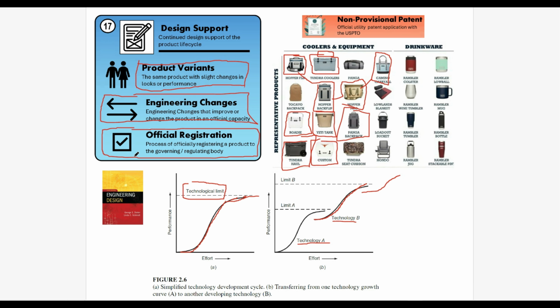And if you did not keep this in mind right here, you might be forced to go back and redo all of the documentation you've created. Every design document, every test that you've done, you might have to retest based off of the official registration requirements. So I know this is just kind of like a bullet point at the very end, but this is very critical and something that you have to recognize very, very early on, which goes back to the product research that we actually suggest you do. That way, when you get to registration, maybe you've done some of the work up front, and all you have to do is package it together.